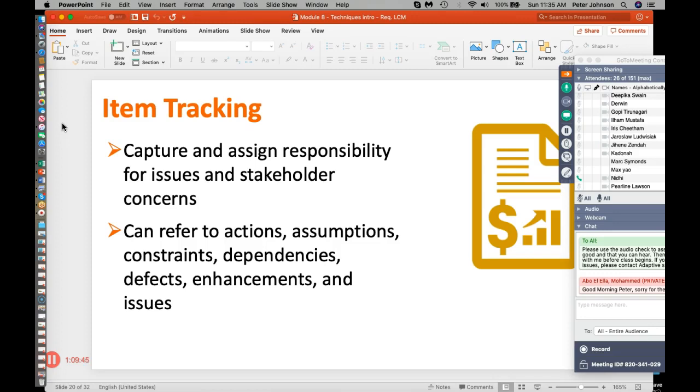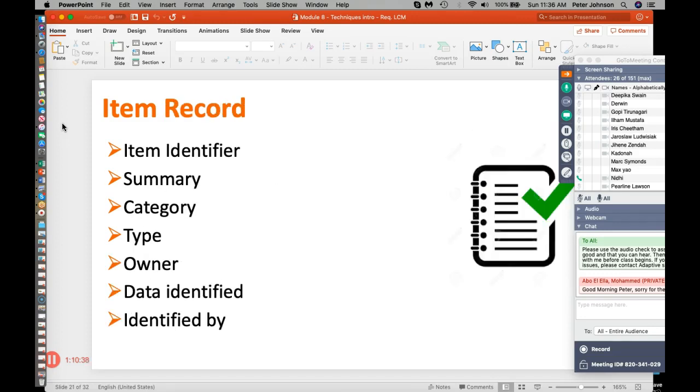Right? So item tracking captures an activity, where that came from, like who was the author, who originated it, who's working on it, who's currently assigned to it, what's its current state or progress. Are there dependencies between different items? Like I need to do this before I can do that, or doing this will help me give information regarding 5 other things. Right? I need to know for different items, if I'm doing test management or test tracking, for example, which ones are defects, which defects are mission critical, which ones are important, which ones I have workarounds, which ones are strictly cosmetic. So depending on what items I'm tracking, I'll have different things I want to capture in my item tracking record.